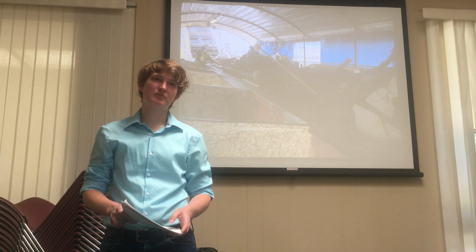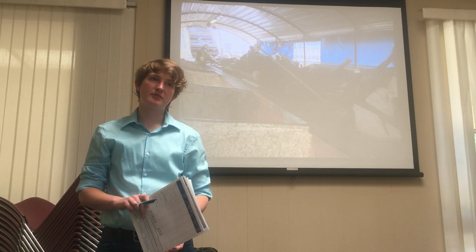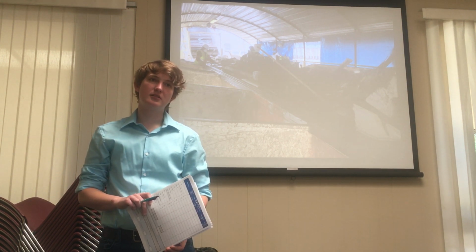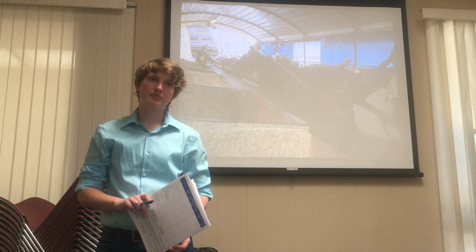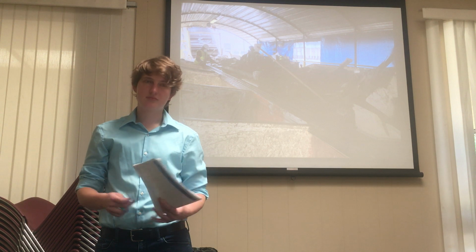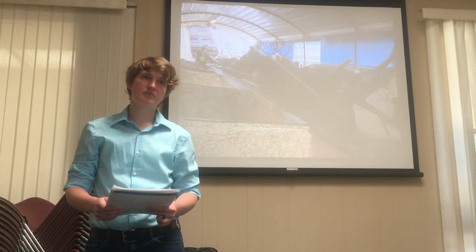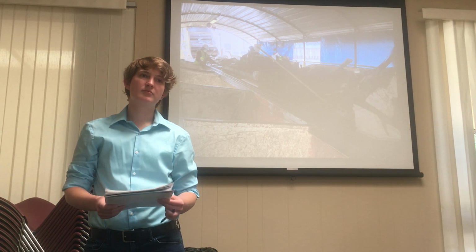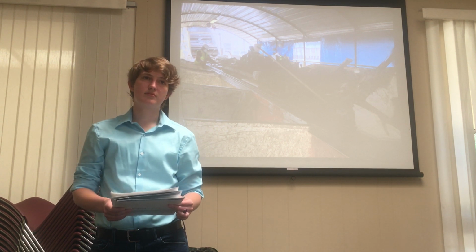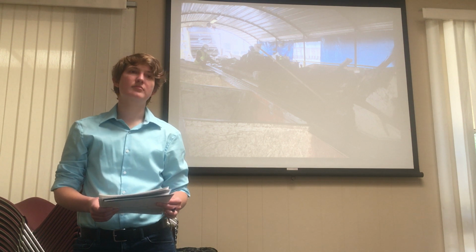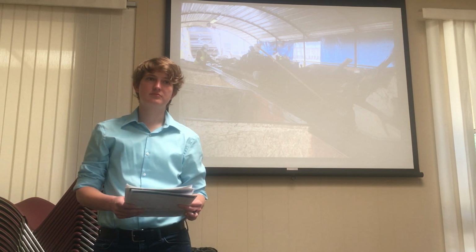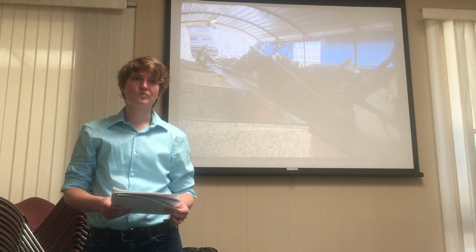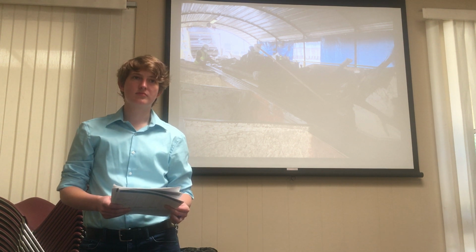Absolutely. I think what everyone's bringing up, there are a lot of disadvantages for the contractor, and I've been there. The first thing you're always going to recycle is your concrete and rebar. That's really easy to do if you're doing a demolition, because that's the only phase of the project that you're truly on. But you ultimately will go to a mixed C&D container, and the only reason you do that is because of all the limitations they're talking about: the size of the space and, most importantly, the rental on the bins. You're going to have to move those every 2 weeks. There's no way you're going to fill full bins, even with 10-yarders, and they'll charge you rental time on those bins afterwards.